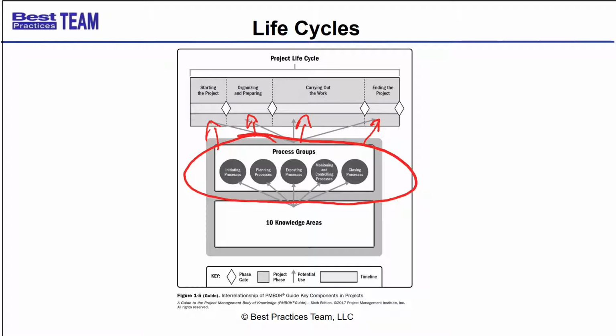And you might say, what? How are we doing that? Well, we're not just only initiating the project with develop charter, kicking off the project, getting it all authorized with develop charter. We must also initiate each phase. We should get each new phase authorized. And similarly, we don't just close out the project in a formal, orderly way and close project. The process is called close project or phase. So we close out each phase in a formal way.